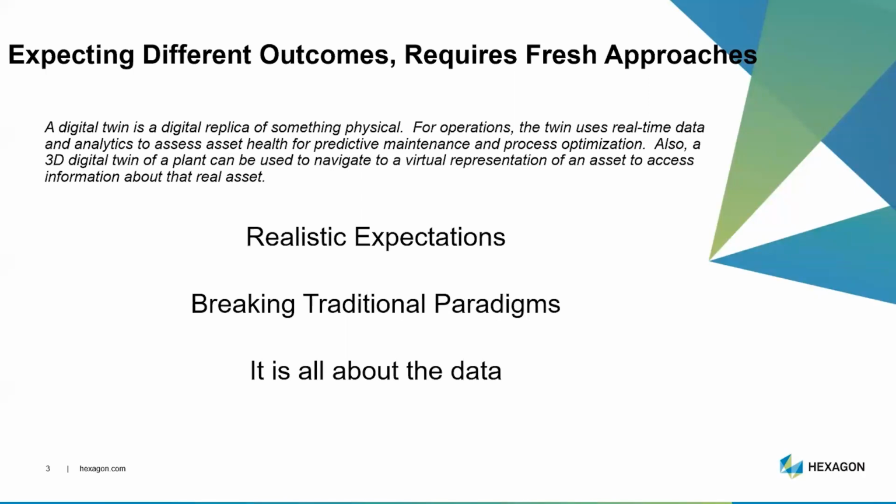So we had to take a step back and say, well, we have the digital twin technology, because of course we were going to build that out. And we had a lot of data, right? One thing we've learned in implementing AWP is that it obviously requires a lot of data, mostly focused on construction though, not so much on commissioning. So a big part of this was understanding how to bridge the gap between the data, the model, the drawings, and everything we had that was focused on construction, and what was going to be needed to support commissioning our plant.